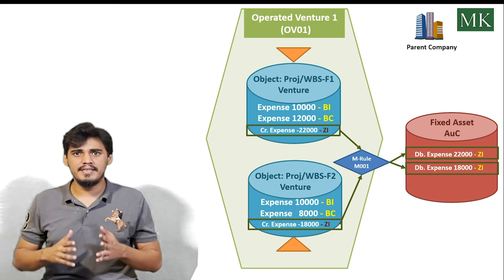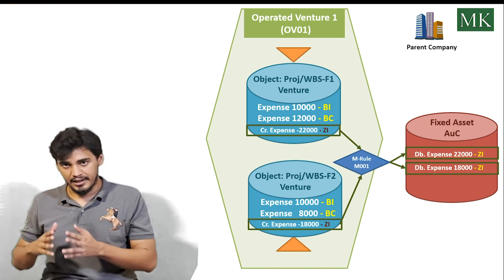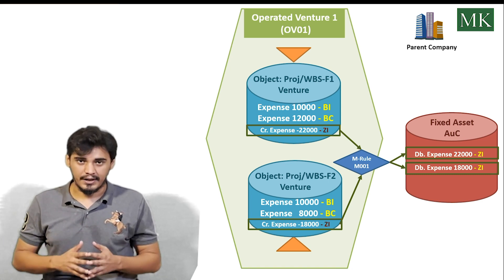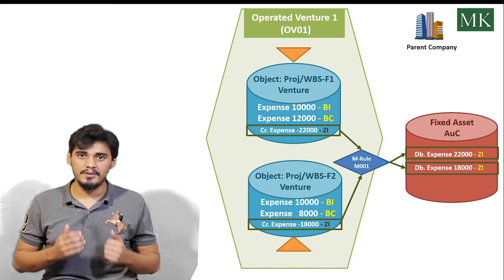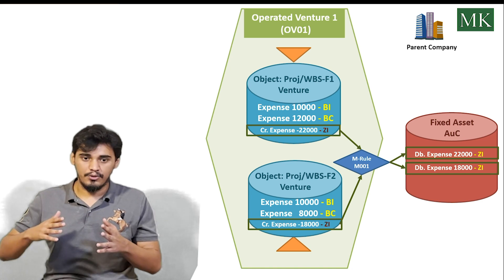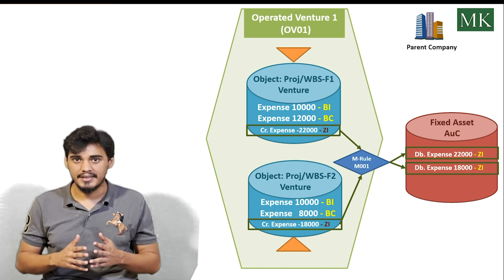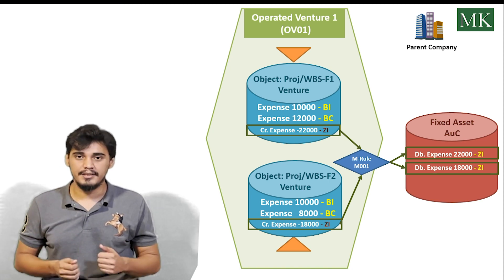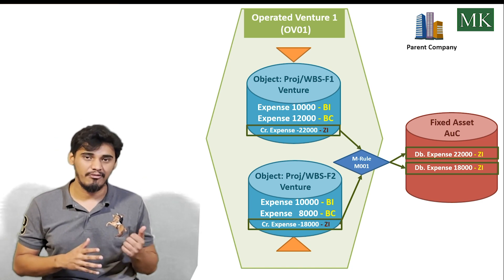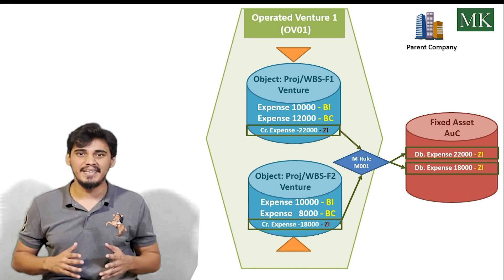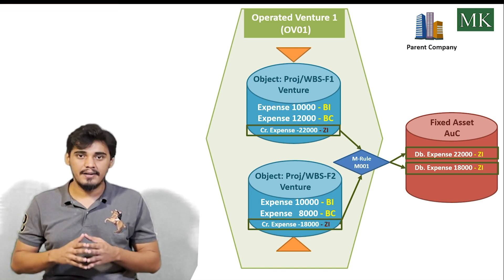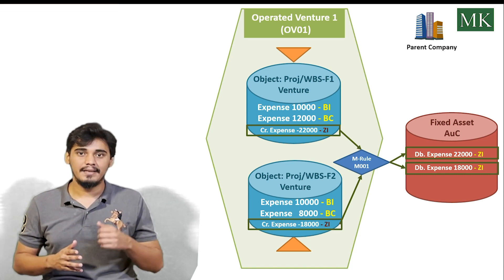This controls the recovery indicator during settlement in a way that when the settlement process is executed, the credit is booked on the WBS element with the recovery indicator ZI, which is a non-billable recovery indicator, meaning it will not be processed by the cutback transaction. As you can see in the figure, the credit of 22,000 and 18,000 is booked on WBS elements F1 and F2 with recovery indicator ZI, and with the same recovery indicator ZI the debit is posted on the receiver AUC.